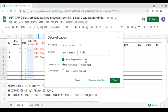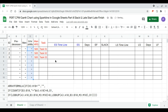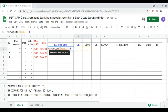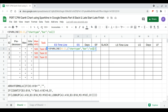There are three shifts in a day, so we set data validation as a list of items with three shifts per day — we'll need three shifts. We continue with the early start timeline, which is a sparkline of the early start and duration. The chart type will be bar, and the color will be white.